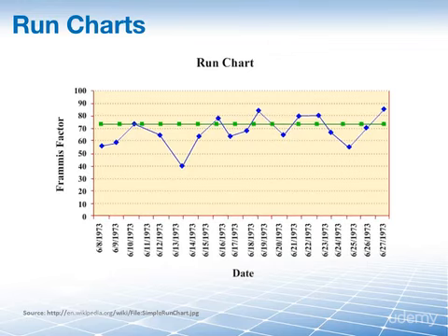For instance, we notice a problem every day around 9 o'clock on our shop floor, and it turns out that at around 9 a.m. several more machines are turned on, causing a drain in electricity. Run charts show trends in a process over time, variations over time, or declines or improvements in a process over time. Trend analysis is performed using run charts, and it involves mathematical techniques for forecasting future outcomes based on historical results.